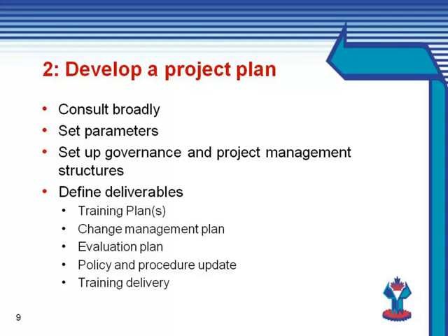The final success factor is that progress and successes are regularly communicated and celebrated. It is also important to establish how you will measure success, and you will need to establish baseline data so that you have something to measure progress against. Establish goals and targets, evaluation criteria, methods, roles, and responsibilities that will enable an assessment of the effectiveness of your essential skills implementation.